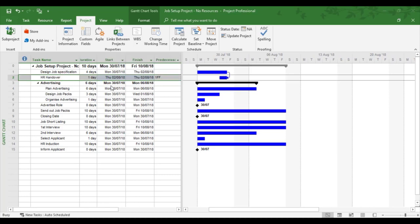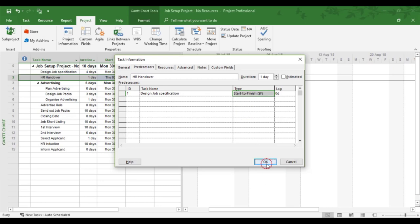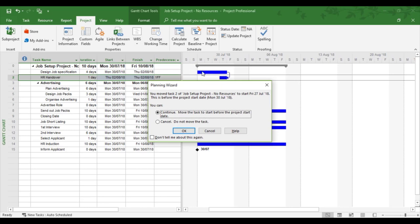If you look at the next one, start to finish. Now this even gives a message because we've got a project start date of the 30th or 7th. Well, what this is going to do is going to bring the successor task before the predecessor task. So it says to you, are you sure you want to start before the project start date? We're going to say yes.